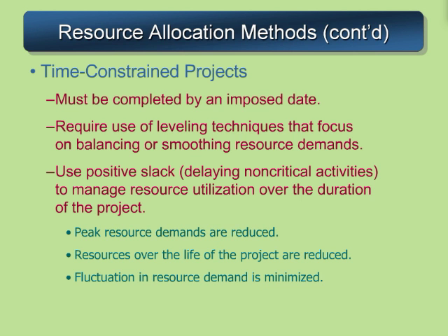Let's take a look at time-constrained projects, and then we'll show an example. So in a time-constrained project, we've got a situation where the project must be completed by a certain date, and then the best we can do is use whatever leveling techniques are available to us to smooth out the resource demands. And we'll do that by using the slack in activities that aren't critical.